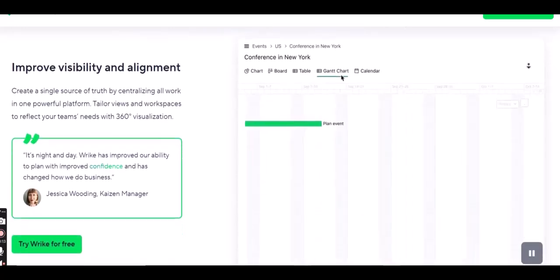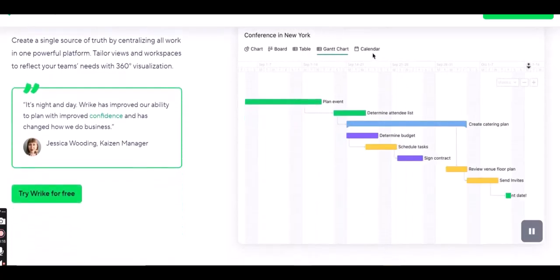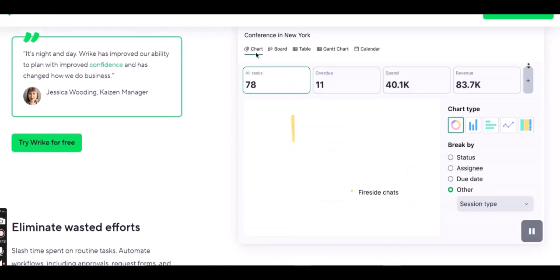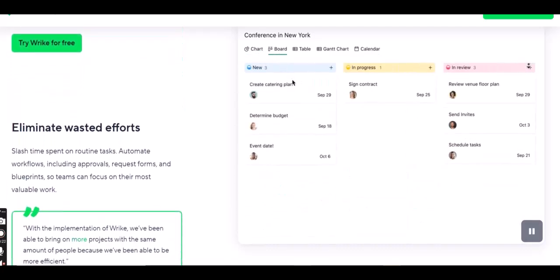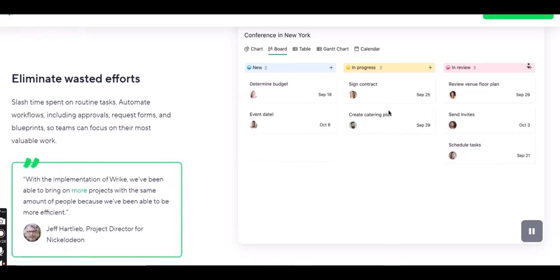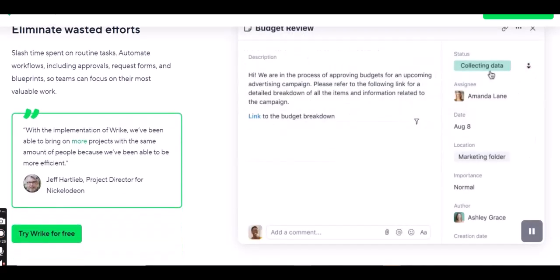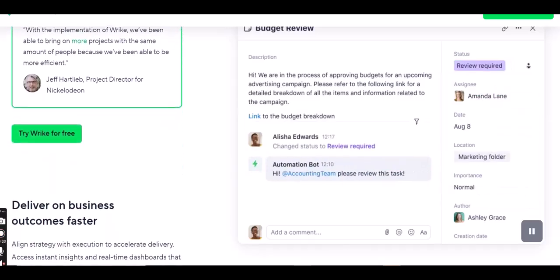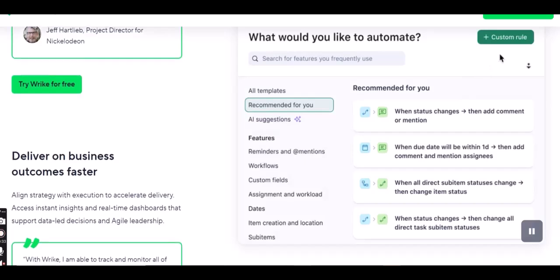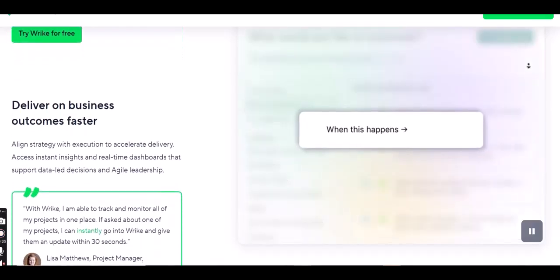Apply workflows. Ensure your project or specific tasks are assigned the correct workflow. This allows you to track progress accurately. Tip for experts: think about your process. Does a task always go from in progress to completed? Or are there review stages, approval steps, or feedback loops? Design your workflow to mirror your real-world process.